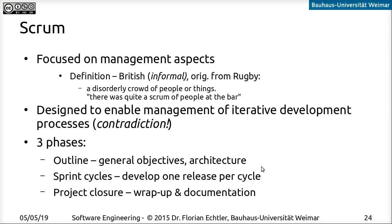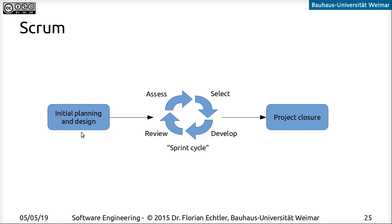Each of the sprint cycles is very much like a release in extreme programming. So there's a bracket around the agile process which does a little bit of planning and design upfront at a high level, and then does a wrap-up with documentation. In each sprint cycle, we have four phases: assessment, selection, development, and review.